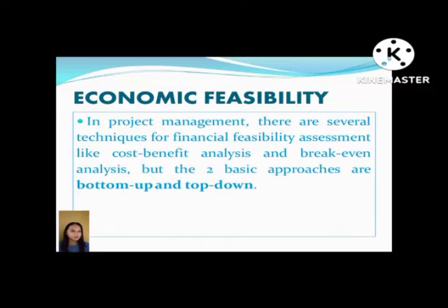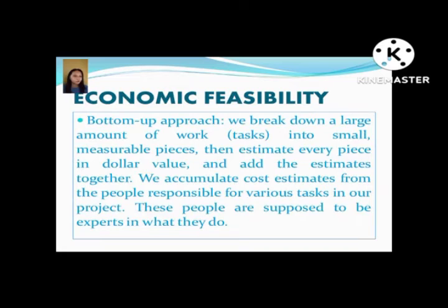In project management, there are several techniques for financial feasibility assessment, like cost-benefit analysis and break-even analysis, but the two basic approaches are bottom-up and top-down. Bottom-up approach. We break down a large amount of work or tasks into small, measurable pieces, then estimate every piece in dollar value, and add the estimates together.